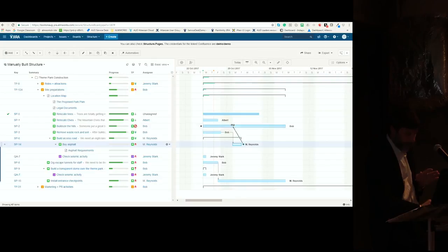We can drag directly from a task up to the entire initiative and say that at this point the initiatives can run in parallel. And that creates a critical path that'll be in red for that next initiative. I apologize for the trouble with the mouse. I might struggle with it through the whole presentation.